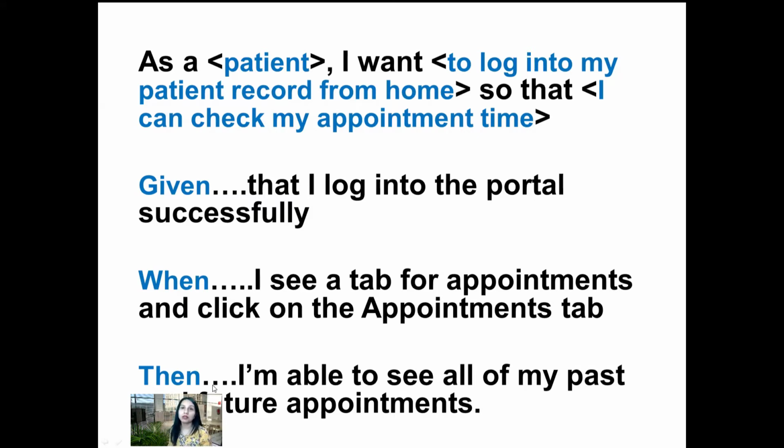So given this level of detail, it makes it very easy for my developer to give me an accurate assessment on how long it will take him or her to code. It gives my QA folks a good understanding of the test scripts that need to be created to test this functionality completely. It gives my UX resources the ability to start doing mock-ups and getting validation from our stakeholders, right? So it makes everything a lot easier when we have lots of details from an acceptance criteria standpoint for a user story. And this makes this user story complete.